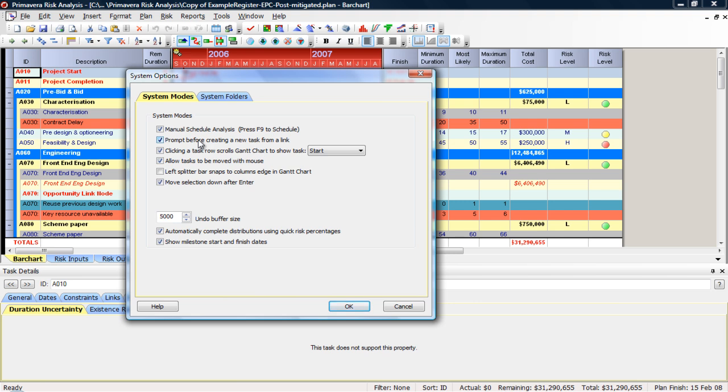Because of the way this scheduling tool works and how you can copy and paste data, you could copy or paste data and create 100 activities without actually knowing it. So that's something to keep in mind if you're doing any kind of bulk editing from Microsoft Excel, etc.